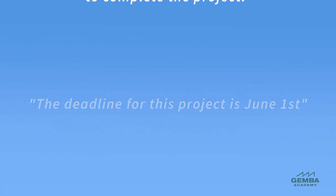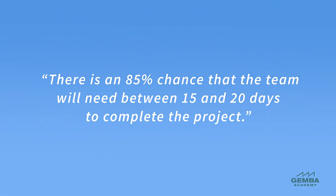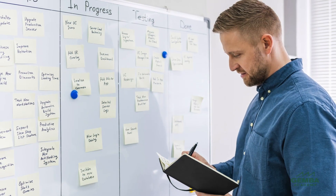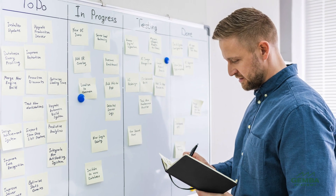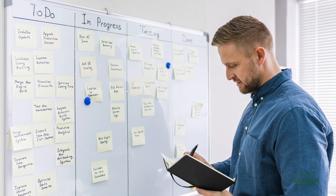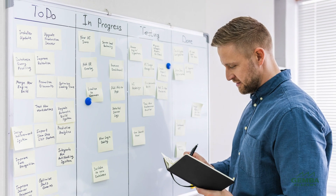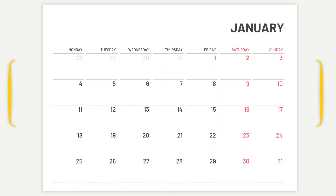In other words, instead of saying the deadline for this project is June 1st, Kanban planning would determine there's an 85% chance that the team will need between 15 and 20 days to complete the project. The Kanban planning approach commits to delivery dates and outcomes, but it does so based on data-driven forecasting. Kanban planning aims for an accurate estimate of a range of time rather than an exact end date.